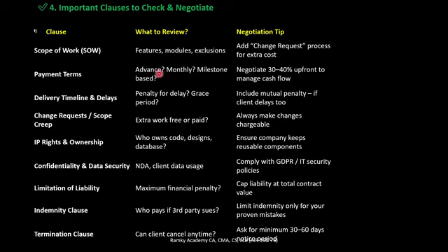And payment terms. Payment terms are very critical after delivering the services. Once the supplier issues the invoice to the customer, within how much time can the client pay to the supplier? Sometimes within 30 days, the client has to pay based on the agreed terms in the contract. From the date of issue of invoice, 30 days, the client has to make the payment.